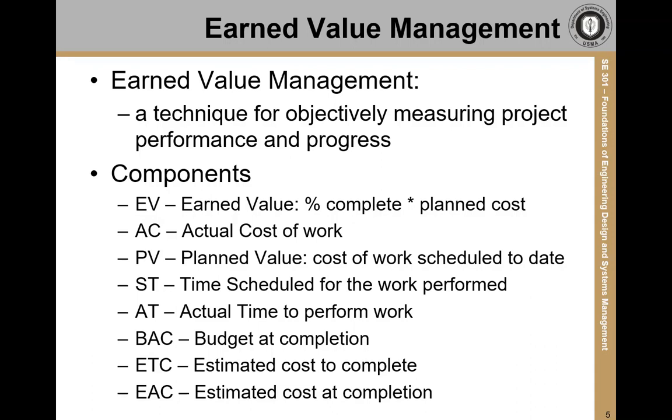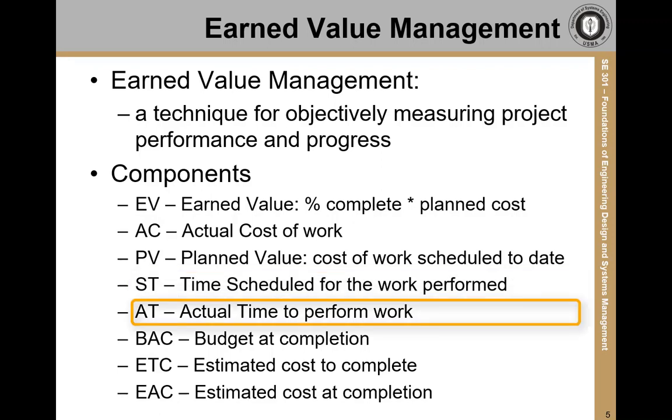Again, using our project plan, we can find out when we expect it to be as far along as we are now. This is the time scheduled for the work performed. We compare this with the actual time that it took to perform that work.